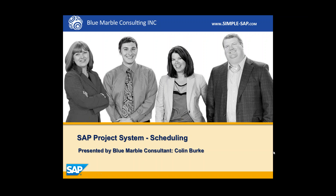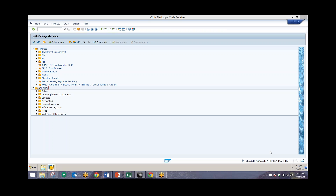Hi, I'm Collin with Blue Marble Consulting, and in this video I'm going to demonstrate SAP's Project System Scheduling. With Project System Scheduling, when you enter the plan dates of WBS Elements manually, the plan dates of the activities are automatically calculated by the system. This determination of the plan dates of the networks is what's called scheduling.